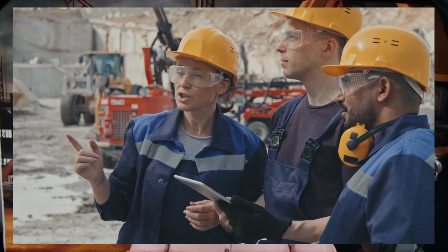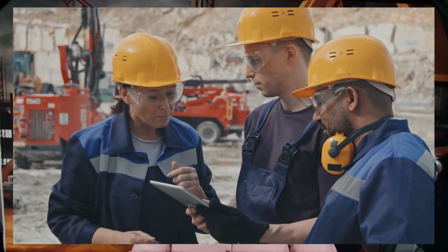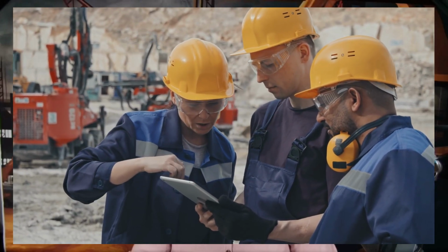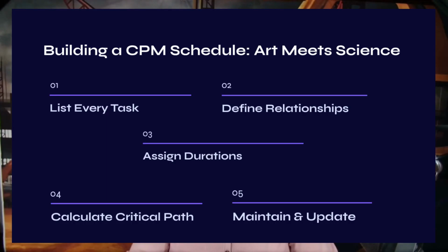Once these relationships are established and durations assigned to each activity, the team needs to consider other influences like complexity of scope of work or timing, necessary skilled workforce required to perform the work, productivity rates, crew sizes, and resource availability. Then run the calculations between the contractual start and finish dates, doing a forward and backward pass to identify your critical path, the sequence with zero float.